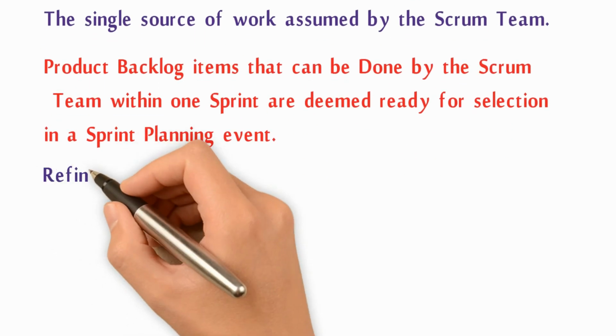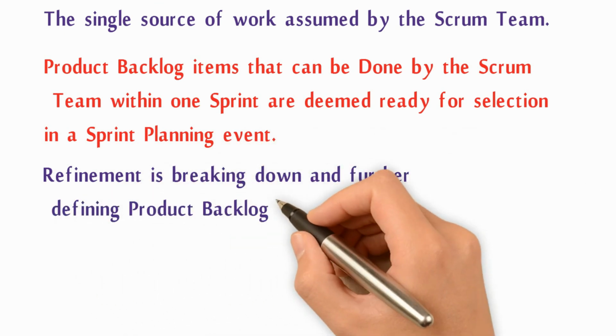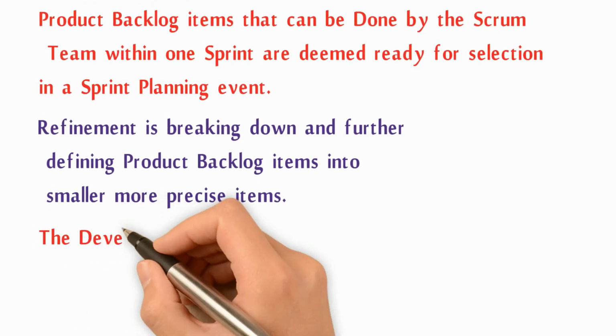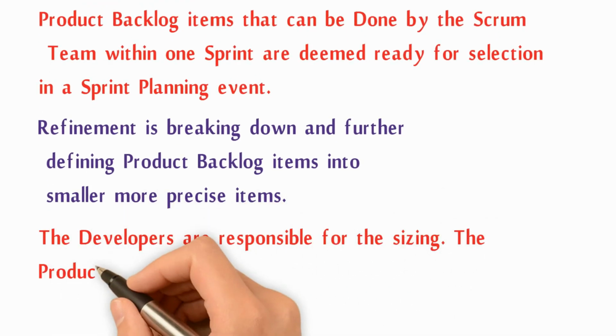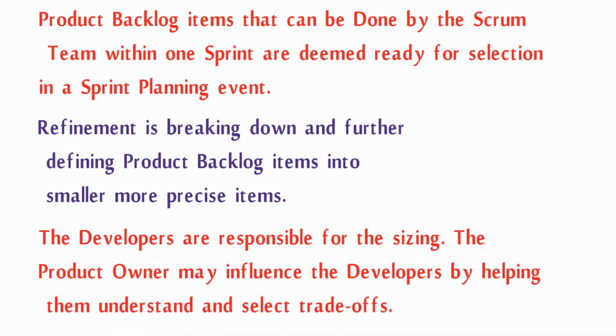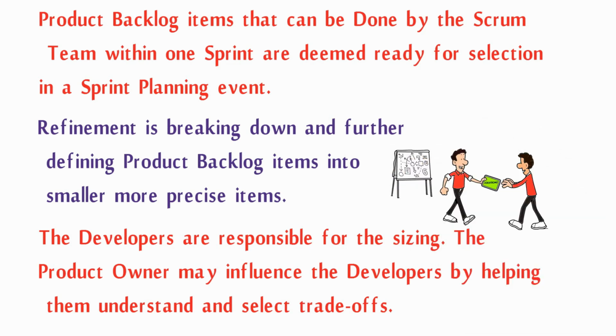Refinement is breaking down and further defining product backlog items into smaller, more precise items. The developers are responsible for sizing. The product owner may influence the developers by helping them understand and select trade-offs.